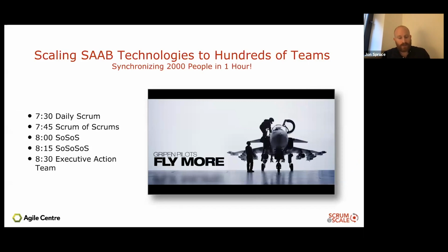One of the Scrum at Scale case studies that we talk about in training is that Saab managed to synchronize over 2,000 people within an hour. And this is how they did it. They met at 7:30 for the daily Scrum. Scrum of Scrums would meet at 7:45, 8 o'clock Scrum of Scrums. And then it scales up to 8:15, Scrum of Scrums. It's quite a complex, very big organization. And ultimately 8:30, the executive action team. So in essence, those 2,000 people within the Gripen Saab Technologies team, hundreds of these teams, managed to sync up within an hour and get these systemic impediments up through to the executive action team in a relatively quick way.